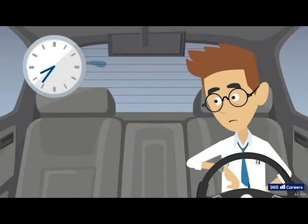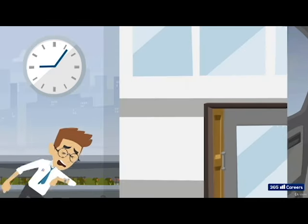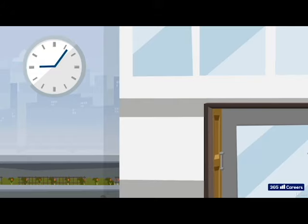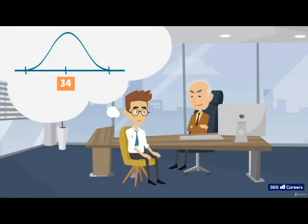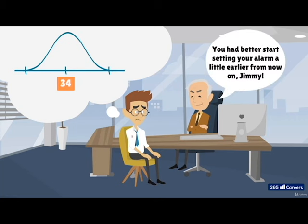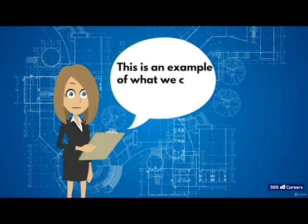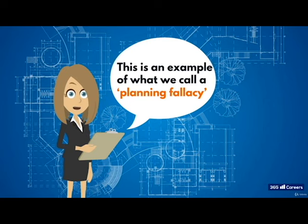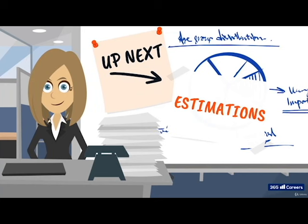Jimmy is not quite the punctual employee he thought he was. In fact, he made it to the office in less than 30 minutes only once. The data showed that on average, Jimmy takes 34 minutes to reach the office, over 10% his estimate. You had better start setting your alarm a little earlier from now on, Jimmy. Now, this is an example of what we call planning fallacy, and we are all susceptible to it. So next lesson, we'll discuss what exactly the planning fallacy is, why it occurs, and what good project managers do to counteract it.